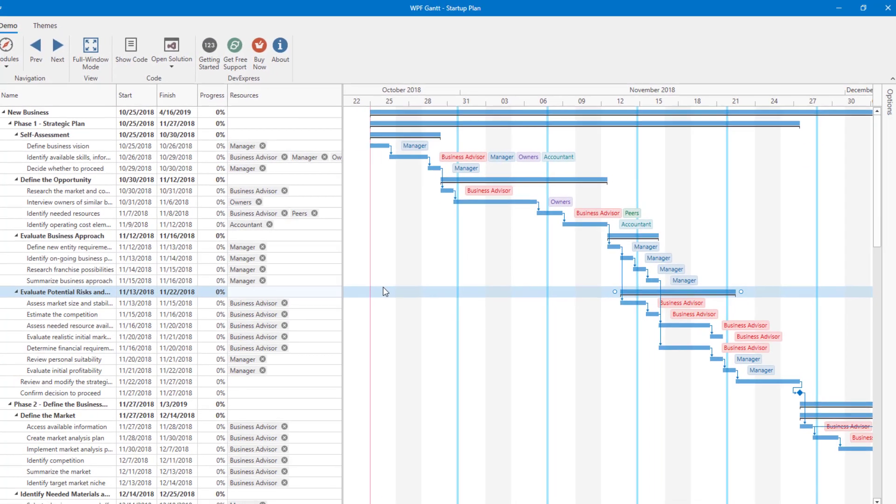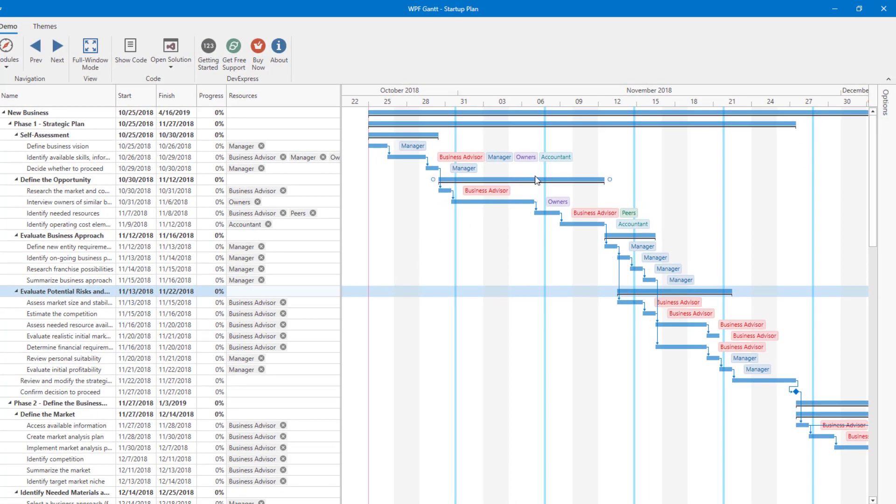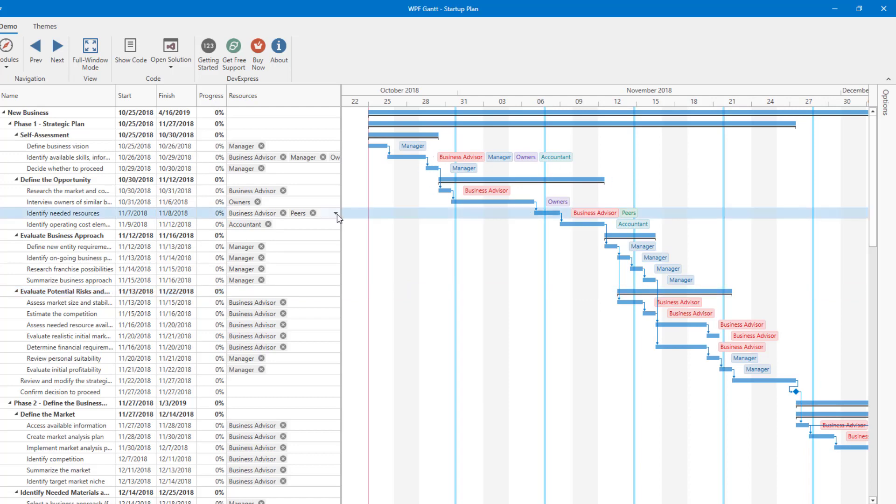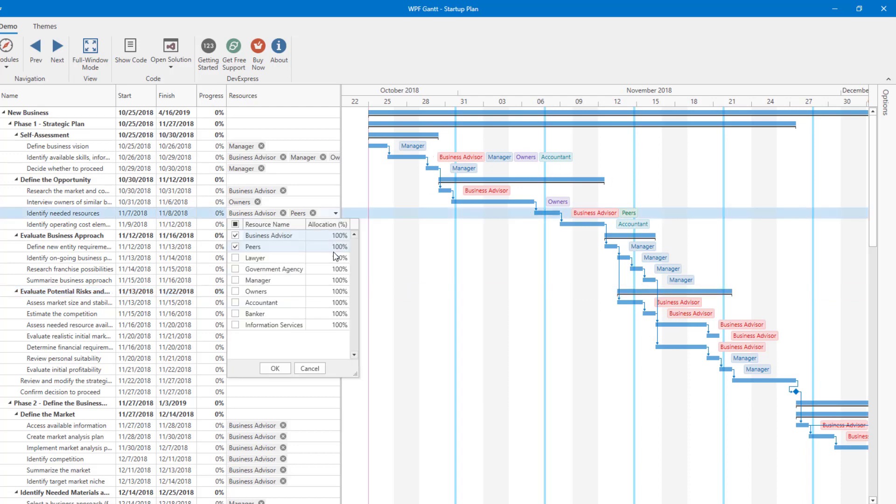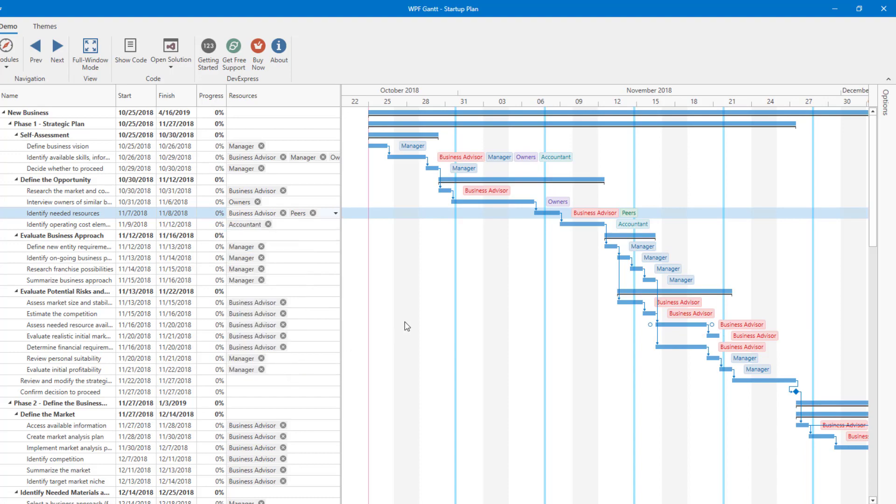Note the Gantt's timeline. These new resource records are displayed directly within the Gantt. Very cool. Now I'll move to another task and modify time allocation information. Once I change allocation percentage values and press OK, the Gantt timeline is automatically updated to reflect the change. Again, very cool.